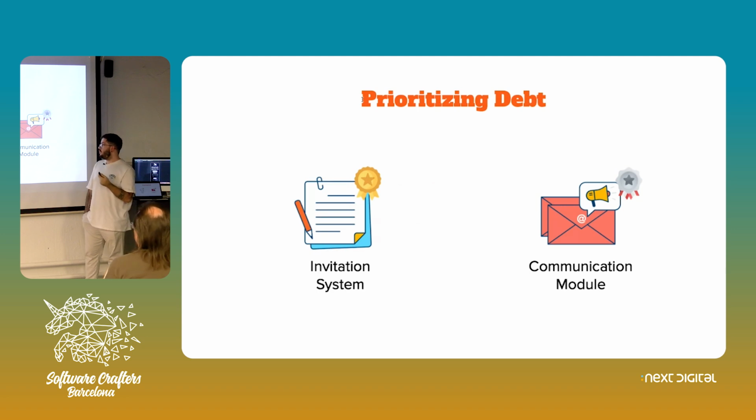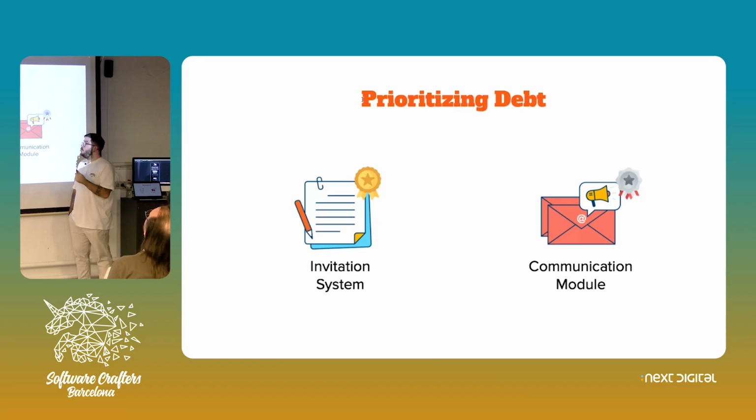Now, some of you may have noticed there are things missing here. The change of user and email got deprioritized, and that sucks. Because before presenting something, we needed to come up with the solution design, the phases, the metrics, and all of that. But that doesn't mean, as I said, it's a no. It's a not for now. So the next time, I don't know the future, maybe in 3 months, we have 150 support tickets for that, and that thing is already at the top of our priority list. And since we already have the solution designed and in phases, we don't even have to implement it ourselves. We can give it to somebody else.